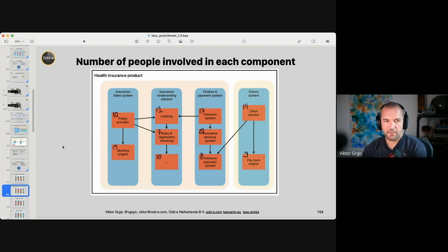I explain. Essentially, I tell them to draw the components which correspond to the boundaries of the teams they're working on, or of groups of teams. So I want to have, on the lowest level, things which are clearly owned by a dedicated group of teams, no matter how large that group of teams is.